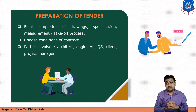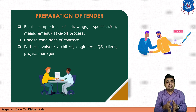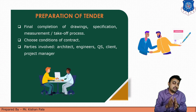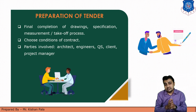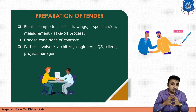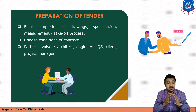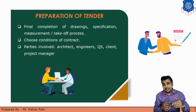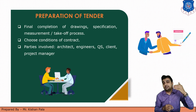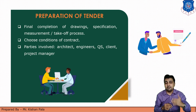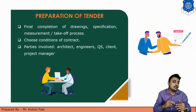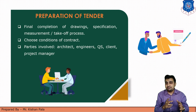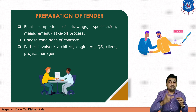The first and most important stage is the preparation of the tender. In the preparation of the tender, there should be mentioned specific drawings, specifications, measurements, and all the details and requirements for completing that work. Because depending upon the measurements, quantities, drawings, and specifications, the contractor will quote the rate for the particular structure. So there should be certainty of the drawings, specifications, and other requirements for that work.